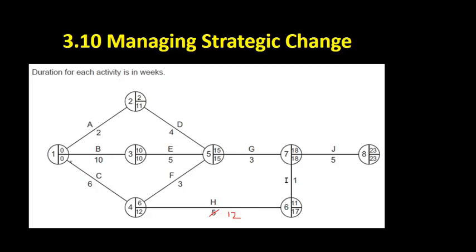So activity C, which is what precedes activity H takes six weeks. So six weeks is the earliest start time. Six plus 12, that's going to alter the earliest start time for activity I because the activity is taking much longer than originally anticipated. So six plus 12 is 18. That is an 18.